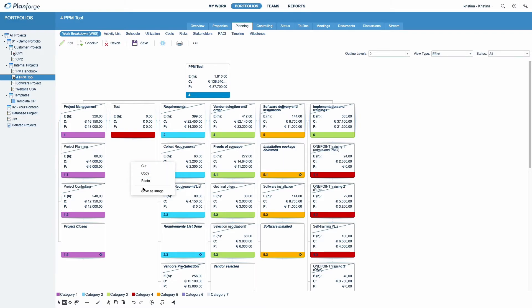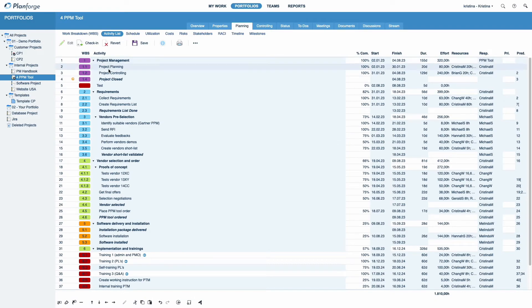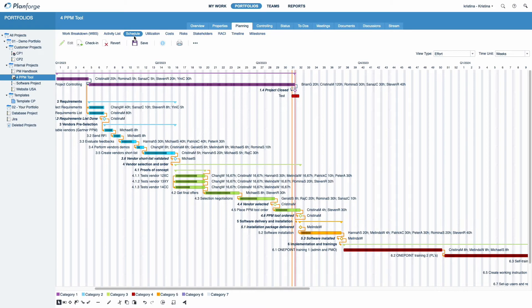Your changes will be saved automatically if you leave the WBS view. Any changes you make will appear directly in the Activity list and Schedule. Learn more about the schedule in our in-depth tutorial.